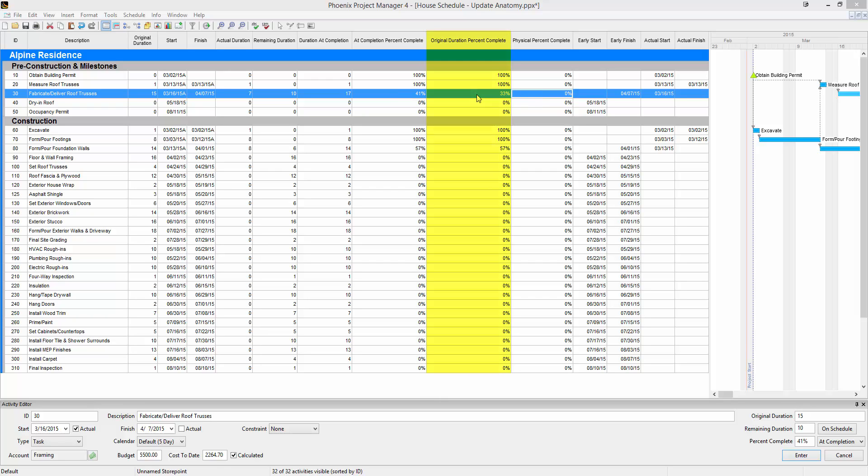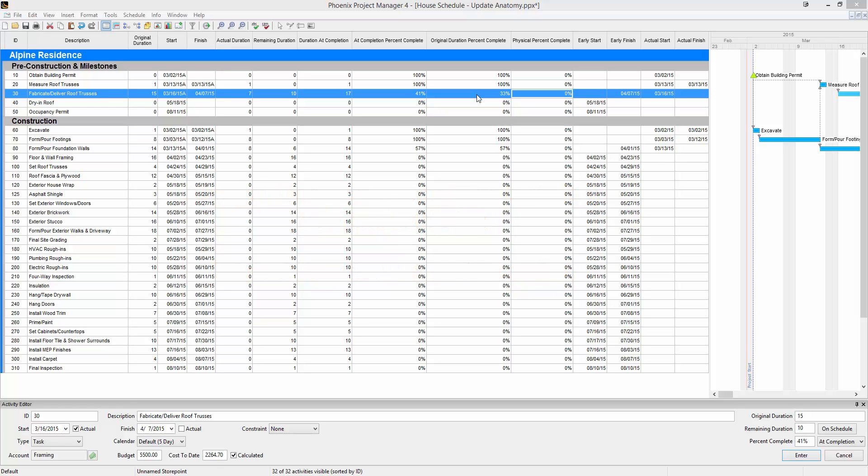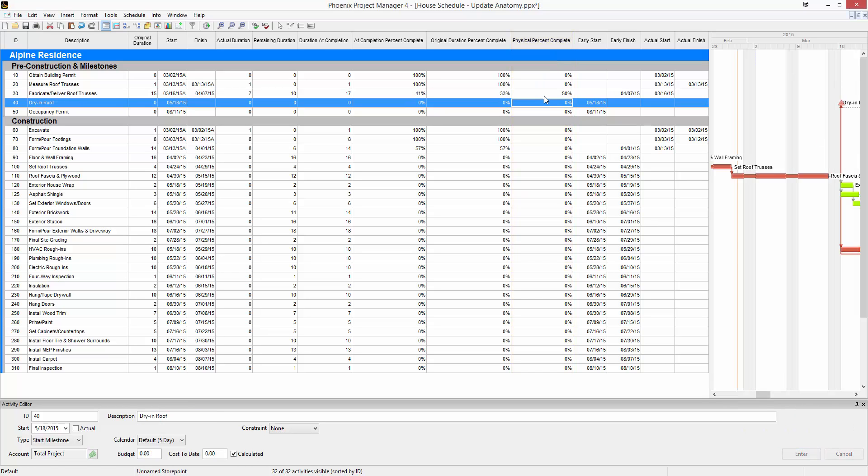There's also original duration percent complete. Original duration percent complete is the original duration minus remaining duration divided by original duration. And then also the physical percent complete. This field is not calculated and is entirely user defined. In here, you can type in the percent complete.